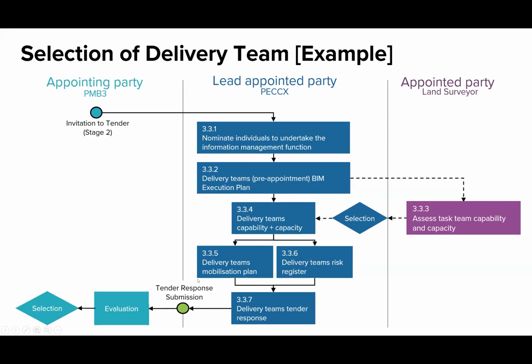And then those responses are submitted to the client, go through an evaluation process, and effectively select your preferred supplier. I know obviously the BIM element is going to be one part of the selection decision. So there'd be a kind of weighted scoring, but yeah, that's kind of the approach that we take to getting to a point where you can select a BIM capable supplier.